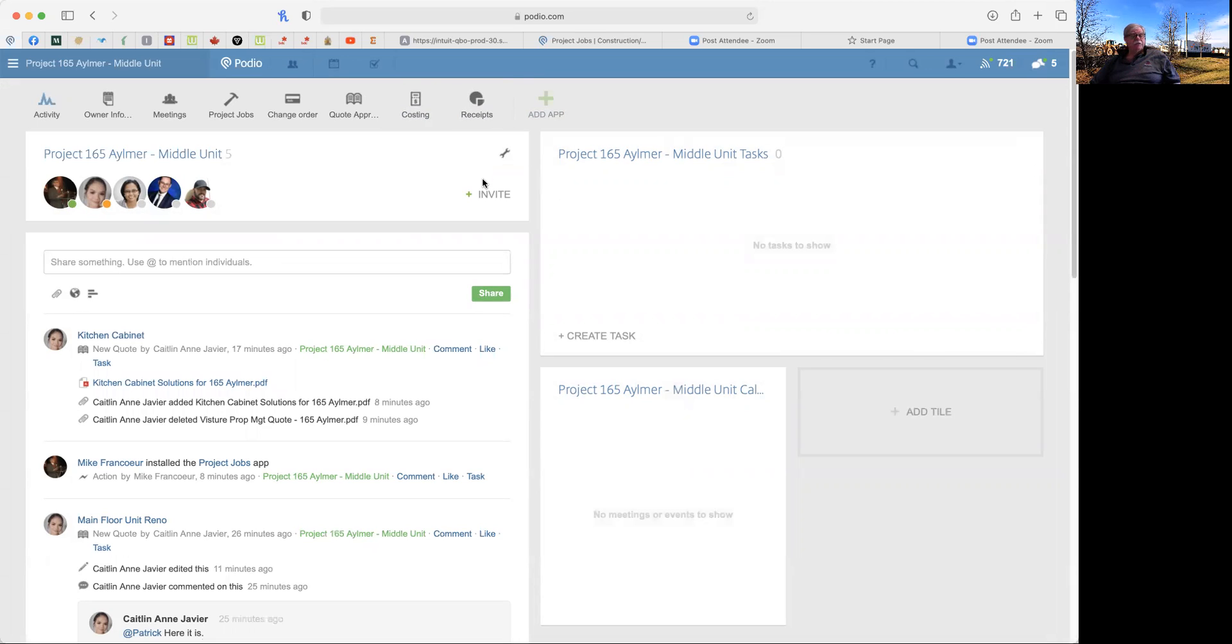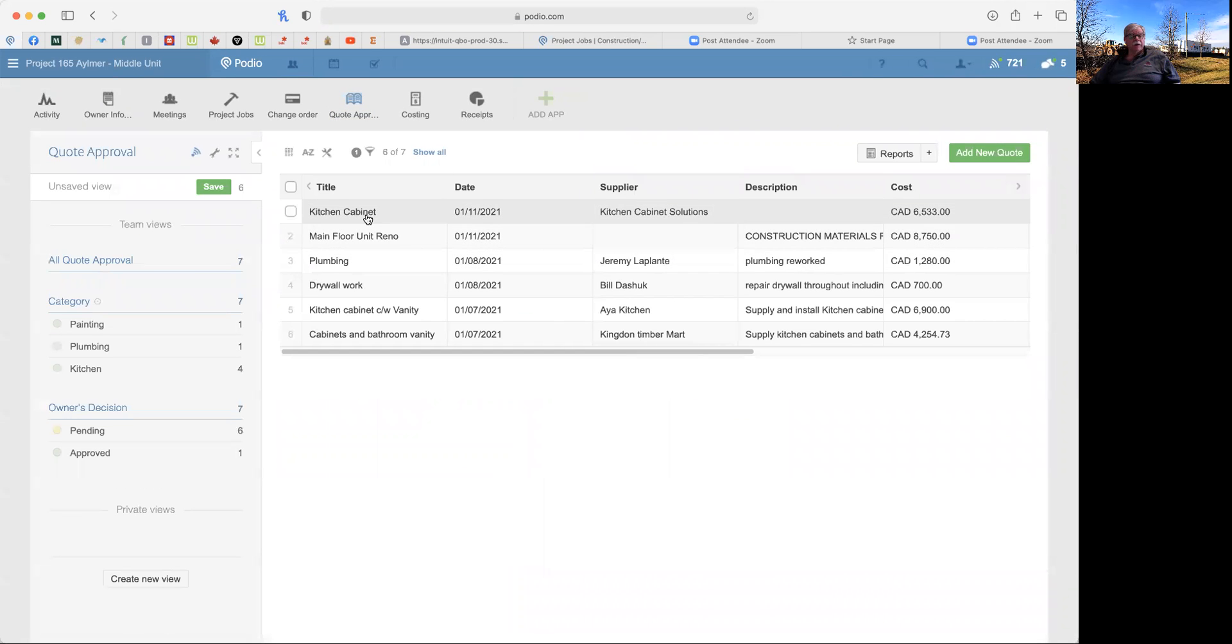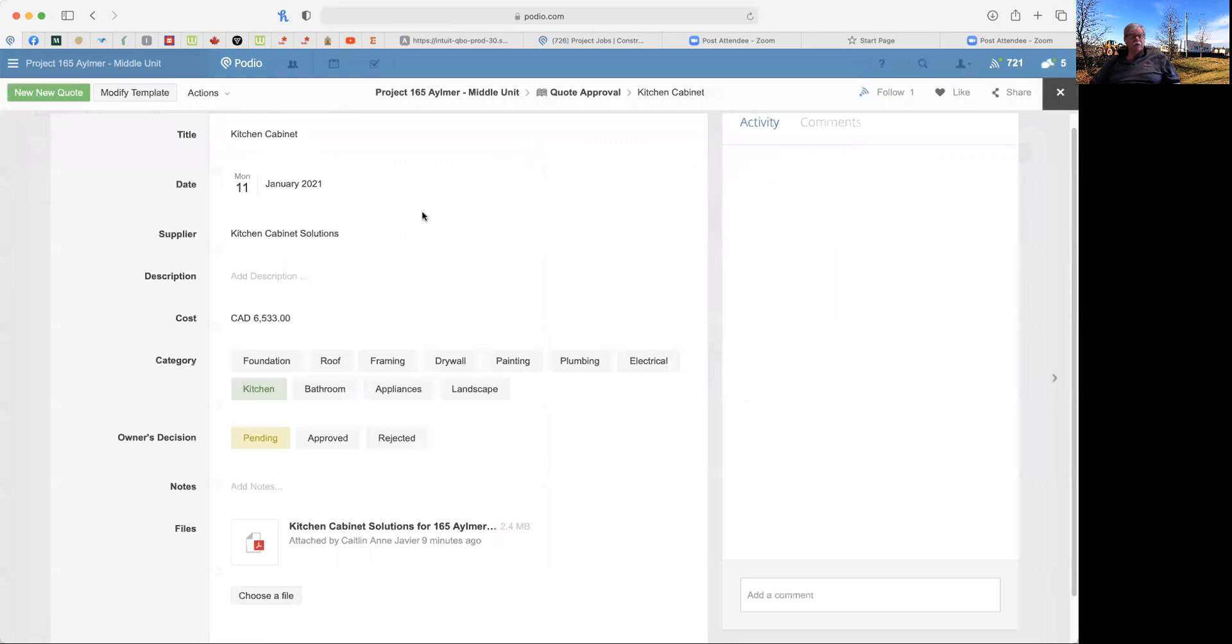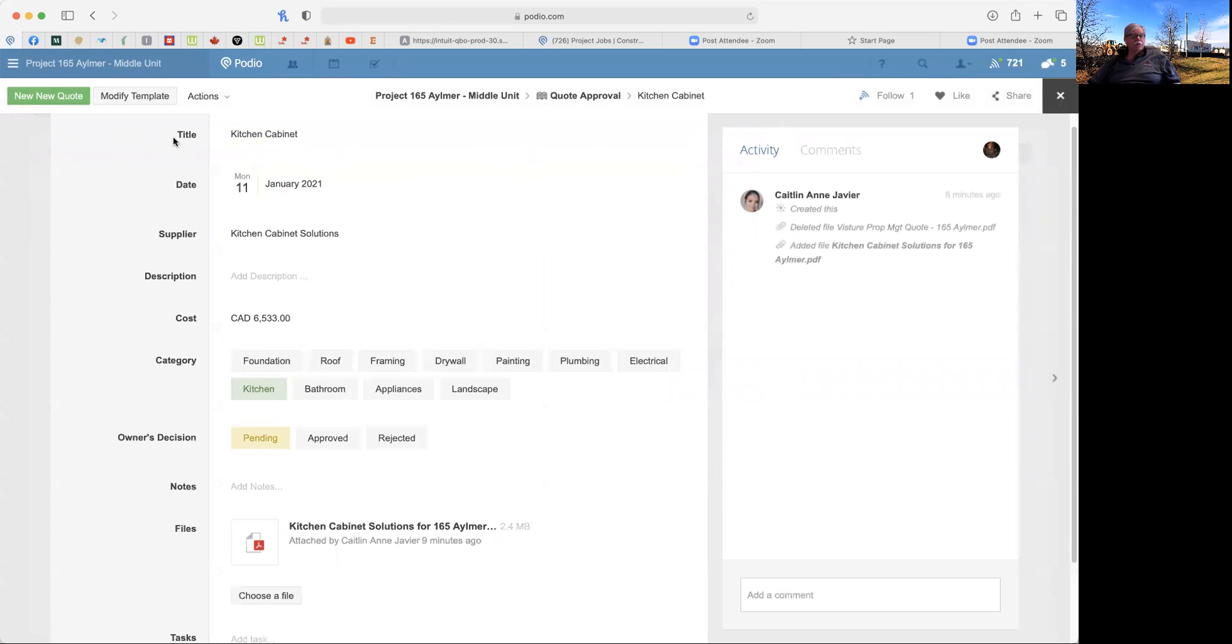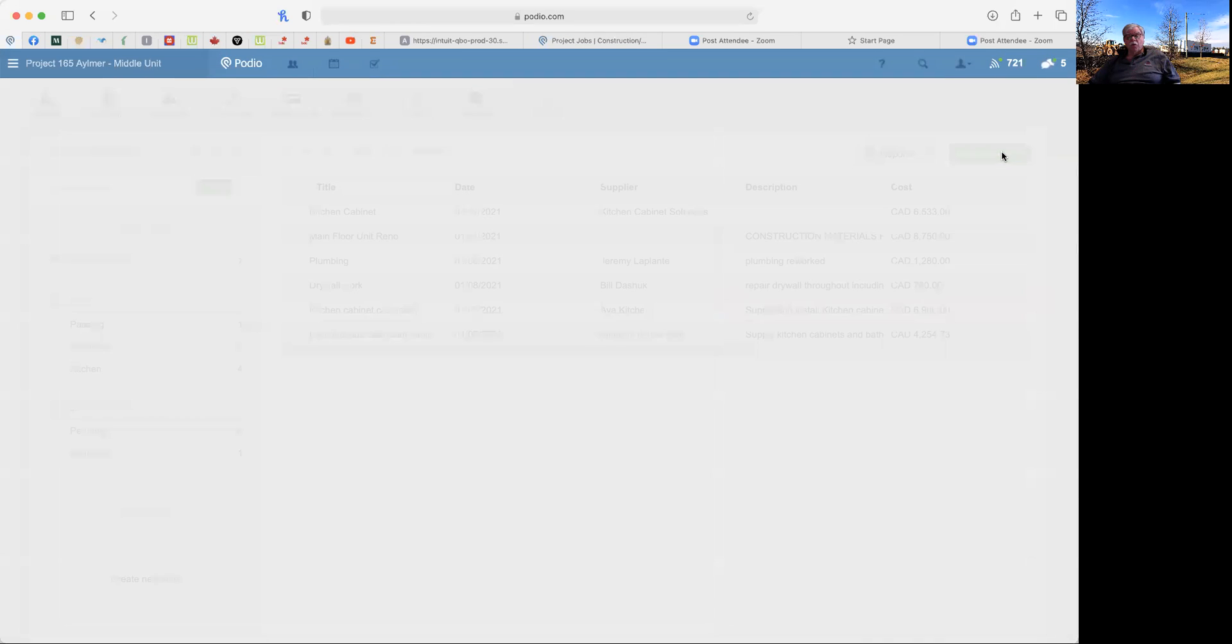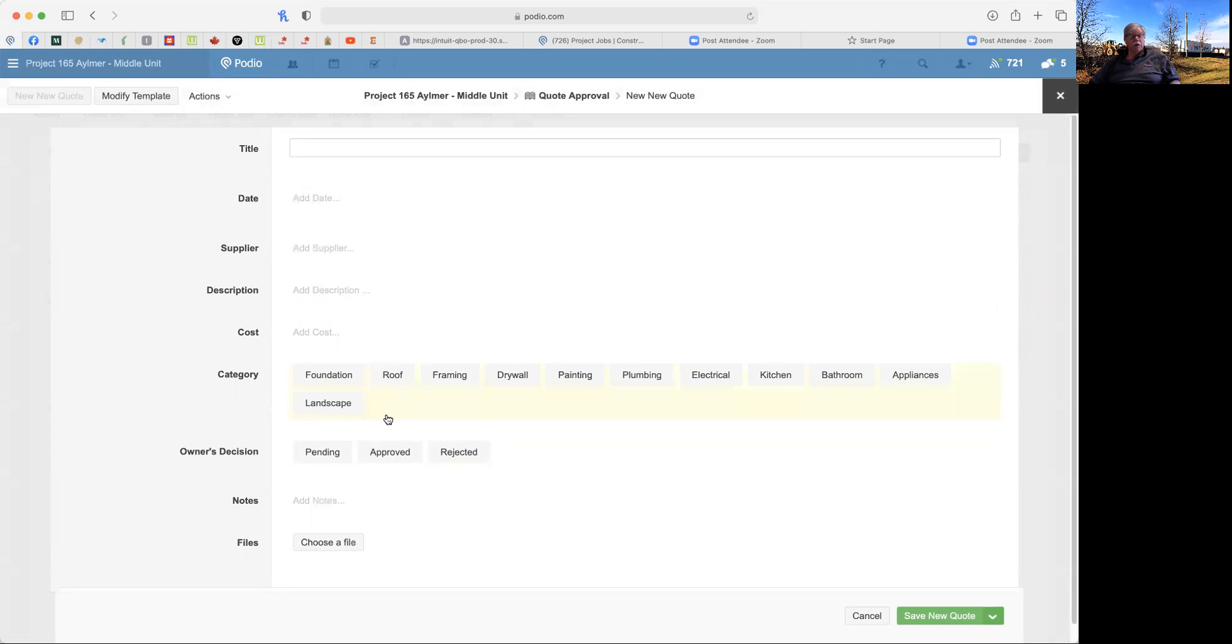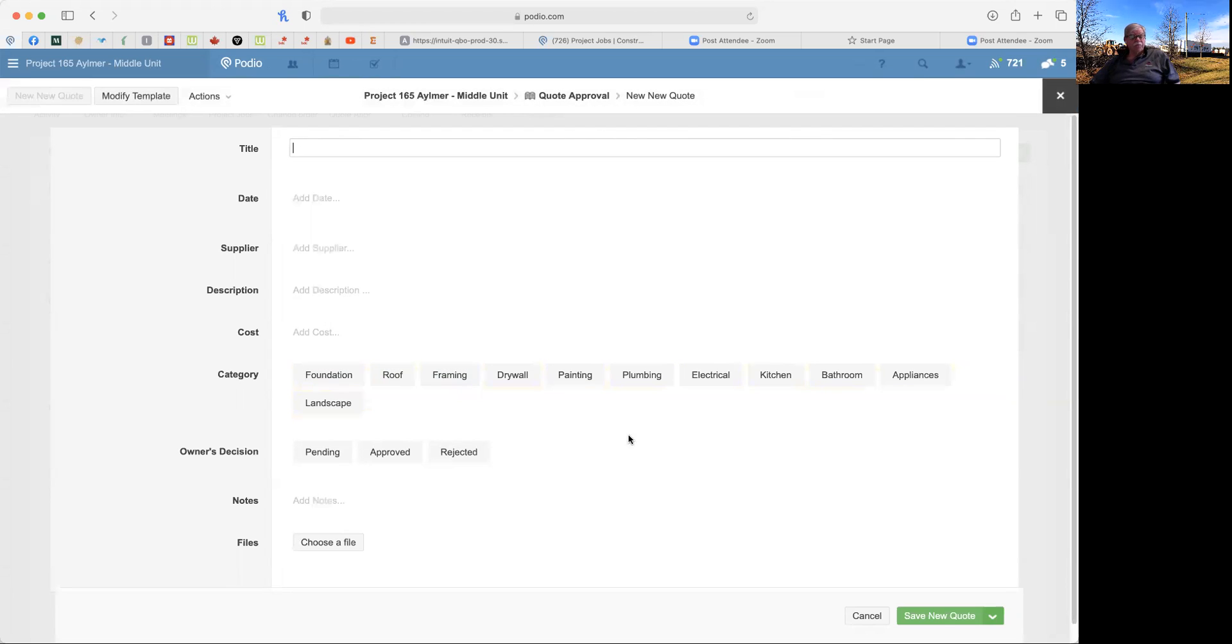And I believe this will get you going. As I said, the most important one will be your costing and your approval, especially your approval, because you need to go in there and your kitchen cabinet or whatever the quote is, it'll have the title, it'll have the date, it'll have the supplier, it'll have a short description, it'll have the cost, it'll have where it belongs to, because if it's a bigger project, you can sort by importance. You start with the foundation, then the framing, then the roof. And some of them have different timelines will need to be approved earlier, sooner, rather than later.